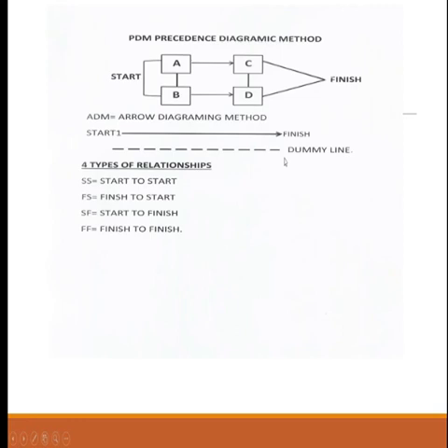All right. The second one is finish to start. You have to finish A before you start B. Why? If A is not done, B cannot even start. Do you understand me? Because you need the output of A in order to kickstart B. You are producing crude oil and you want to produce petrol to run your gen. Your gen is useless without fuel. So the generator starting must wait until the crude oil has been completely refined and petrol is available to start the gen. It is called finish to start.